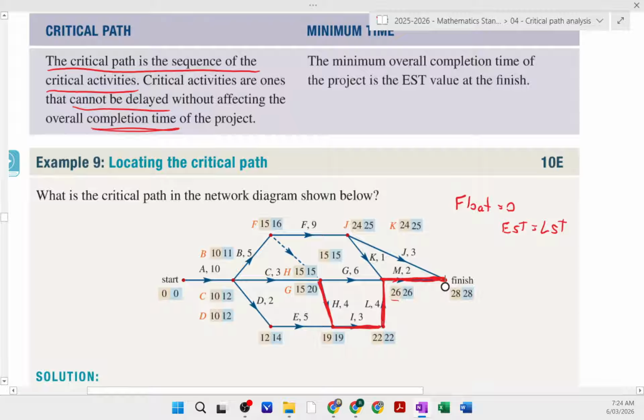Now we're looking at it going, okay, which one's next? Well, if I went back by that way, activity C, I would be looking at that, and that has a float of 2. So we have a look and go, what are my other options? Well, I've got this dummy activity that I can follow, and that actually has a float of 1 there.